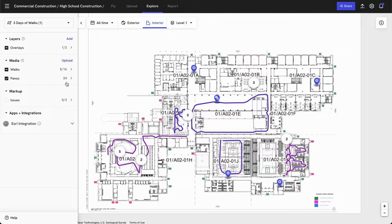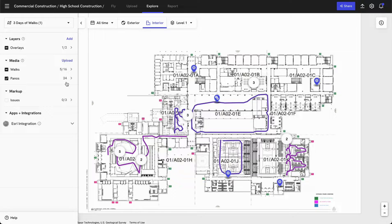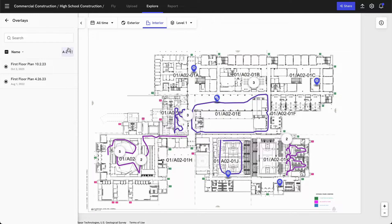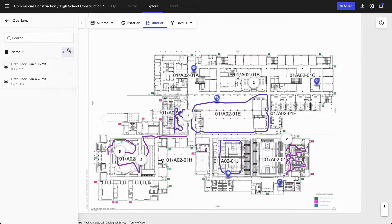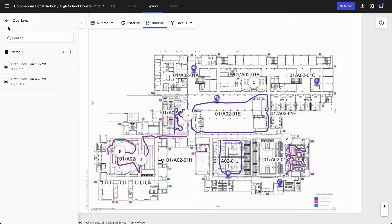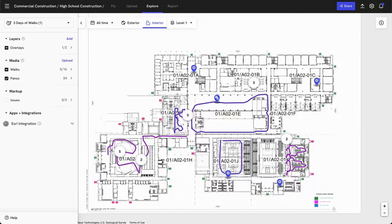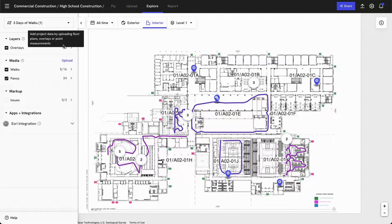To establish this level, we also need to bring in a floor plan or a site drawing in order to map these walks against them. So we've already gone in and uploaded a first floor plan drawing, and if you have any revisions, you have the ability to bring them in here as well.